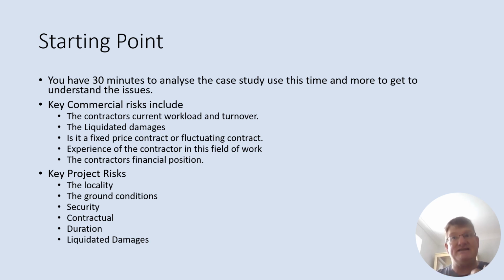Now, bills of quantities minimize risk. Having a contract, particularly JCT or NEC, even more so, minimizes risk for the contractors. Again, going back to key project risks: liquidated and uncertain damages. How much per week will I be penalised if I don't meet the target date? All of these things, just to reinforce.